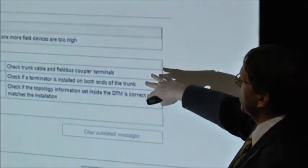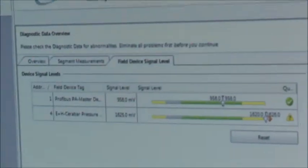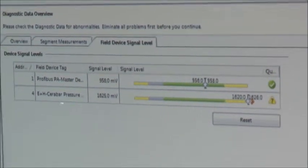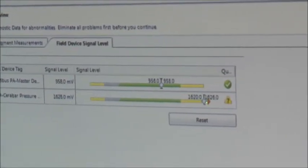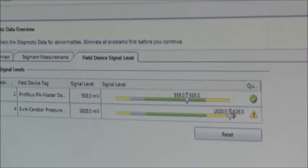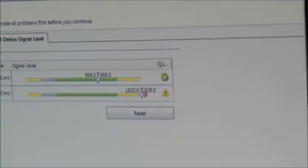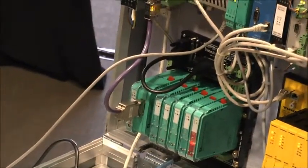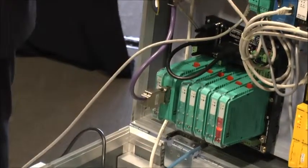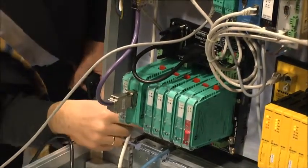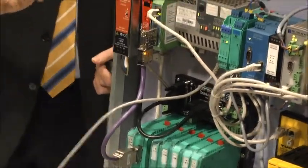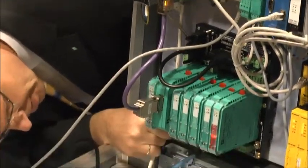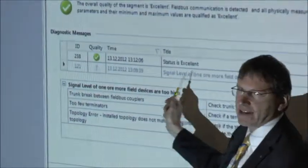So we get some hints from out of the DTM what the failure could be. In addition, I can, for example, check my field device signal levels, the measures of the field device. So when the signal is too high, we have too few terminators. So we can again go out and check if everything is correctly installed. This is the second mistake I made. This installation only to show what can come out. So the problem was we have here, directly on the motherboard of our segment coupler, we have the possibility to switch on and off the termination. So I switched it off for demonstration purposes. Now I switch it on. Obviously now it's okay. We have an in-spec state.